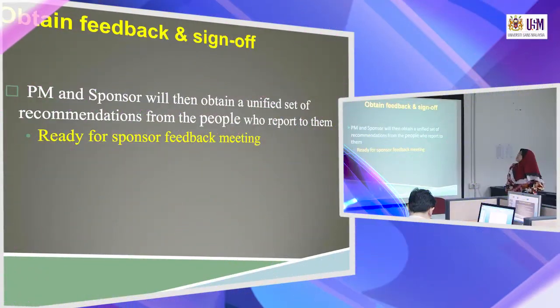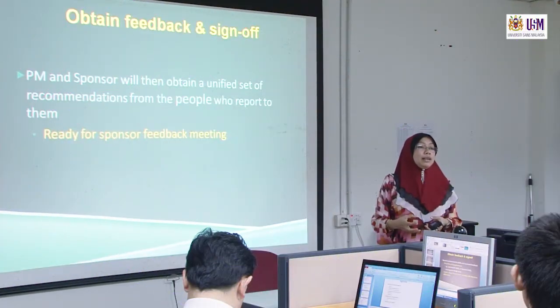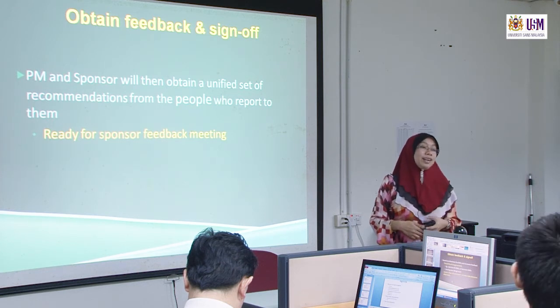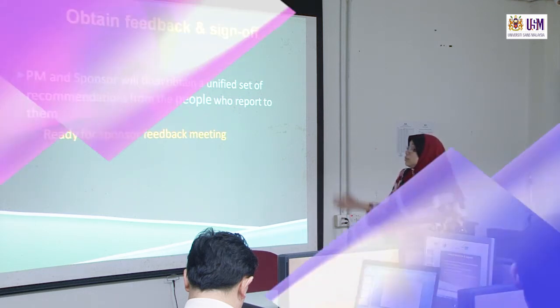Okay, obtain feedback and sign off. So the project manager and sponsor will then obtain a unified set of recommendations from the people who report to them, ready for the sponsor feedback meeting. For our seminar we don't have to have a sponsor feedback meeting, but we have to have a verified letter. They verify that they are going to sponsor, so that when we are near to the seminar, they don't say, oh sorry, we cannot sponsor, and then you are all in trouble. So you need to get the sponsorship ready.